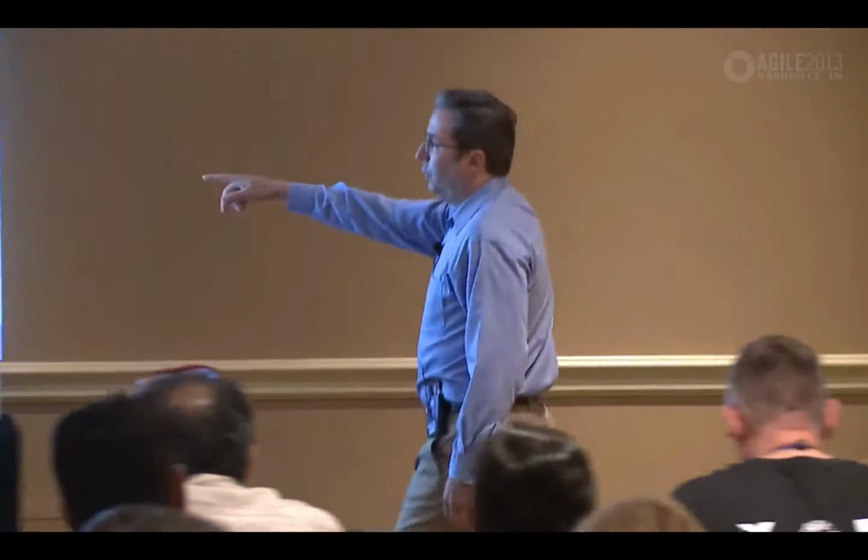All right, we've talked about cost of delay. Let me put it into context. So in that picture I just showed, what if you have to wait 6 weeks for the art team to do it? Whatever you put in their queue, from the time it goes in the queue to they start working on it, it's going to take 6 weeks. That's just the time it requires for them to get to it. What if that delay could be eliminated by taking the artists and assigning them out onto the individual teams? Right? Now we're talking about team structure choices. Did I have a discipline-specific team called art, to which all art-required work goes, gets put into queue, or did I, in a sense, take the artists and assign them out onto the equivalent of feature teams, right, to do the work?